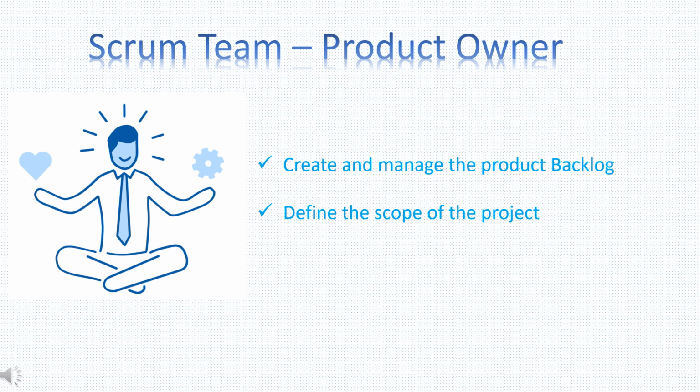While the product owner is surely responsible for the product backlog, this work is not done in a vacuum. Rather, the product owner will do this in collaboration and with the assistance of the development team. With the product owner focusing on functional features and the development team focusing on the non-functional items, the product owner, and no one else, is responsible for defining the scope of the project.